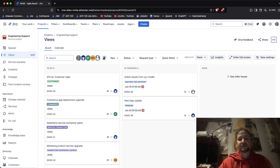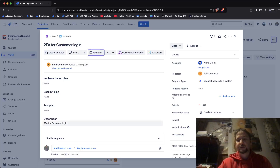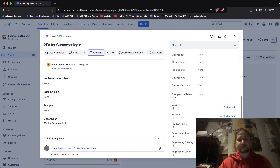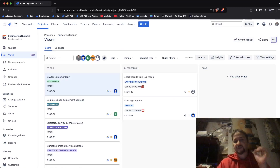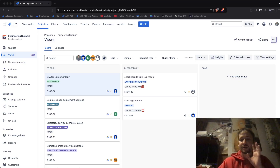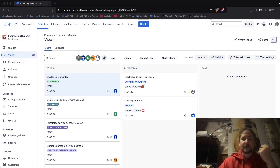This is your board, and these are the issues that were moved in here. As you can see, components show 'None' — the component data has been lost. This is something you need to keep in mind and know the consequences of when doing a bulk move like this. That's all about bulk moving issues in Jira. Don't forget to like, share, and subscribe — I'll see you in the next video!